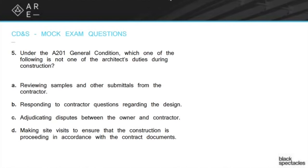Responding to contractor questions regarding the design — that's what an RFI, a request for information, is. The drawings may be very clear for most things, but there's bound to be something they just don't understand or want to confirm, like whether a smoke detector should align with signage or be offset. Those kinds of details may not be fully addressed in a smaller set of drawings, so RFIs are absolutely part of your process.